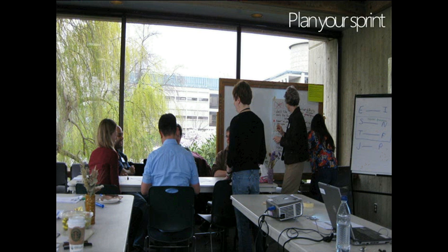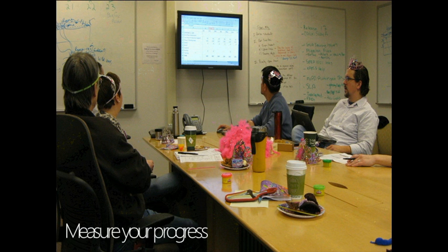And then you break those things down into the tasks, and you really plan your tactical execution of all of the stuff that's on your sprint backlog. As your sprint progresses, you're going to measure everything that you do. So you're going to measure how long it has taken you to deliver those tasks, and you'll notice that you've got stuff that's going to come up over time, and all of that stuff is going to be measurable in Visual Studio. So you've got your hours, your remaining work each day. As it changes, you'll indicate how much work is remaining on the remaining stories.